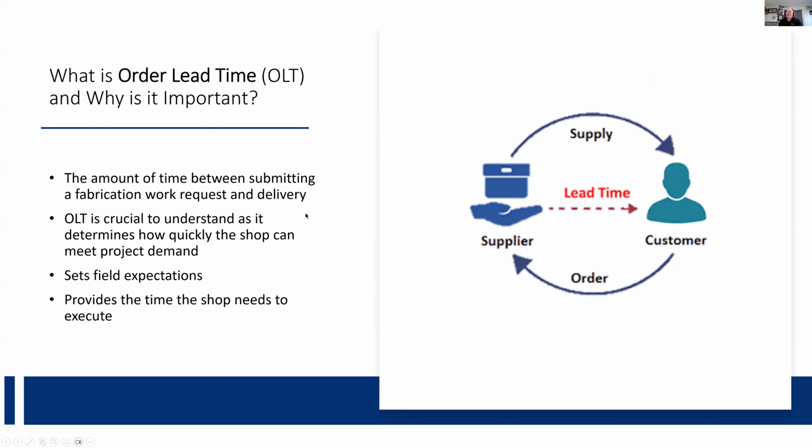So, what is the order lead time and why is it important? Again, it's the time from the order coming in to the time our customer, which is our projects, can actually receive the fabrication and it can provide value to the project. So it's the time to value that we're measuring here.